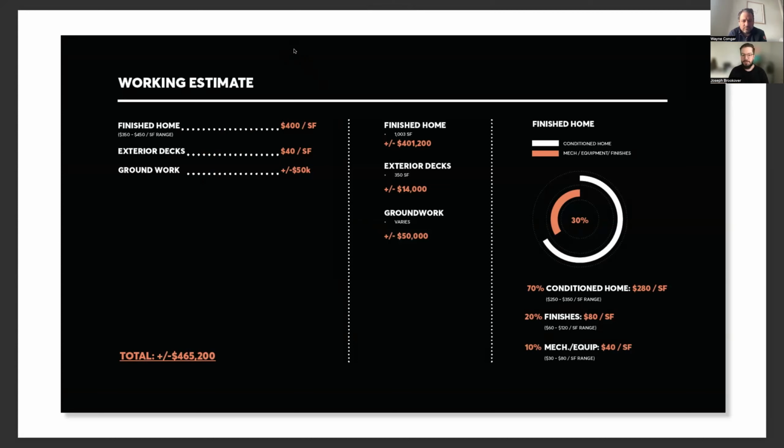We also went through, and we do this on all of our projects, cost estimating really from the very beginning at site planning, to set our budgets for the project. So we know what we're trying to hit for the cost of groundwork. We know what we're trying to hit for the cost of building the shell of the project. But that also establishes a budget range for interiors, fixtures, and finishes. And you'll see here that somewhere around 20% of the total project cost is going to be our budget for fixtures and finishes.